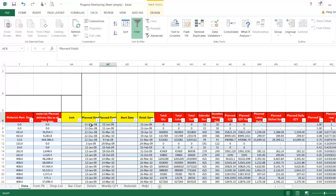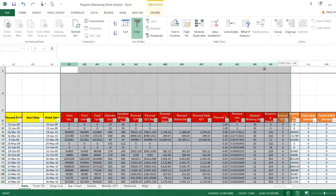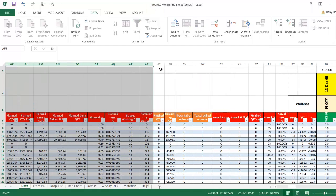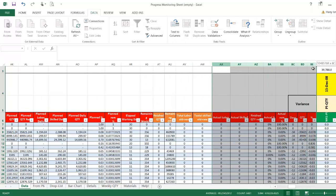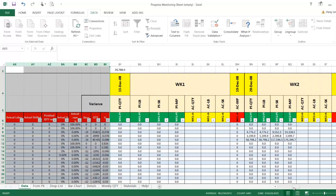Planned start and planned finish are already linked from Primavera, but you can supersede the formula if needed. You can enter actual start and actual finish manually. For forecast finish, you can either enter it yourself or leave it to the schedule — if you enter a start date and actual figures, the program will calculate a forecast completion date. All the red sections are automated — no need to enter anything. The orange section is for the recovery schedule, which I'll discuss later.